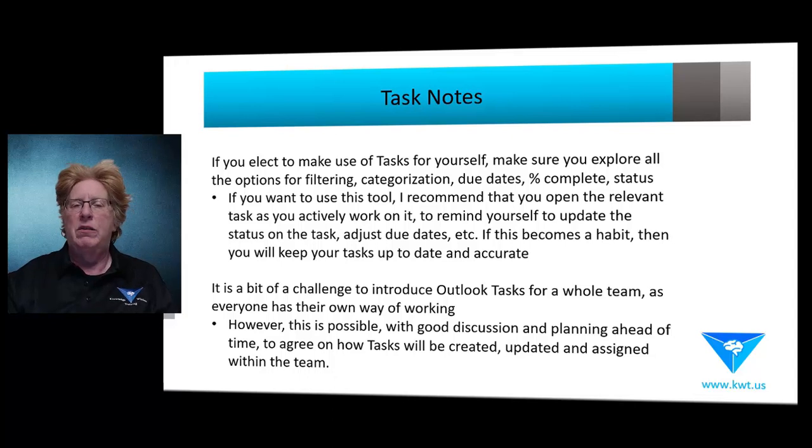So again, you should be in there at least once a day to look for your current tasks that are due today or tomorrow. And you need to manage them to make sure they get due dates, to make sure they get the correct categorization, that you update the percent complete and the status along with that. So tasks are great. If you choose to use them, you have to keep them up to date.